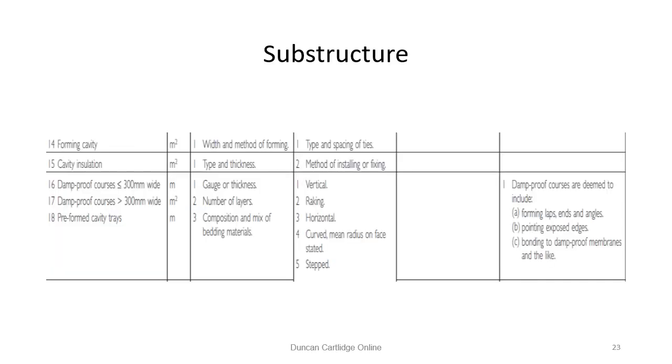Page 167 of New Rules of Measurement 2 contains the rules for the measurement of cavities, discussed earlier, and damp proof courses, which will be dealt with on the next page. Once again, the mean girth can be used for this item. And you've probably come to the conclusion that it's essential that the calculation of the mean girth is accurate. Any error will have a knock-on effect for several items.